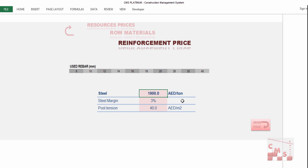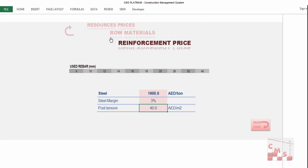For reinforcement, we insert prices for steel and its margin — commonly 3%, 4%, or 5% according to site condition or company policy. We also insert the post-tension price per square meter if the project has post-tension. The user diameter is already inserted in quantity surveying, so here we only modify the price according to your location.